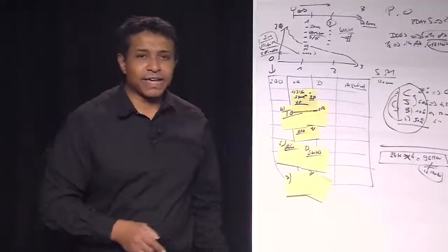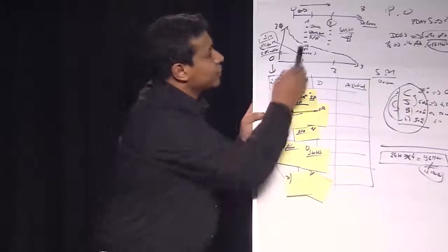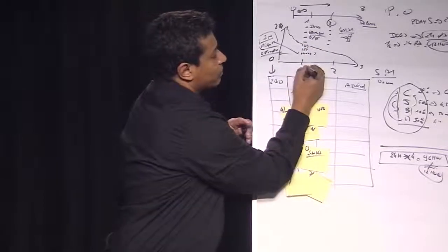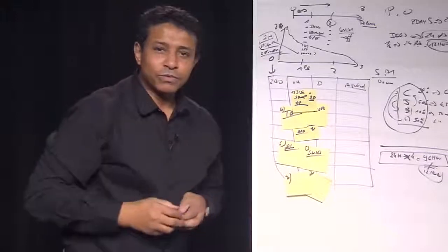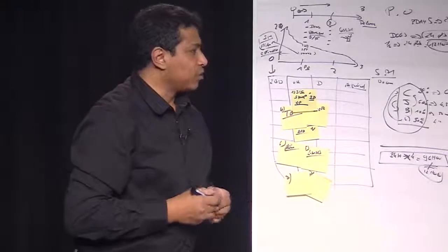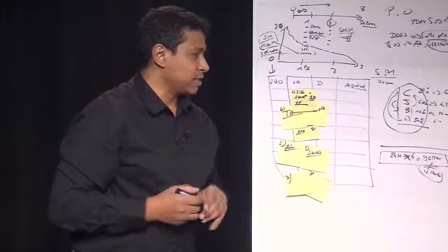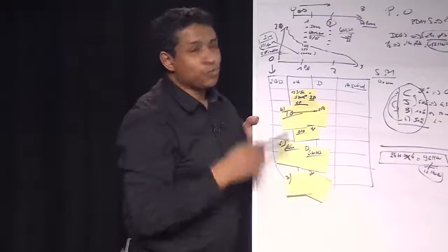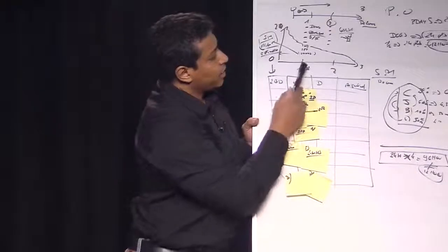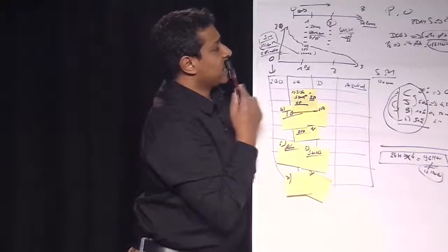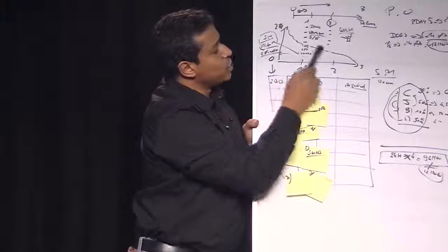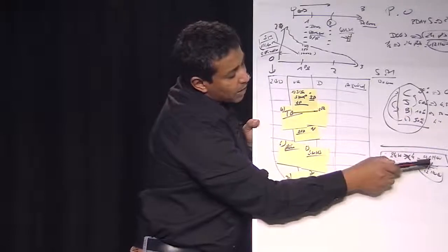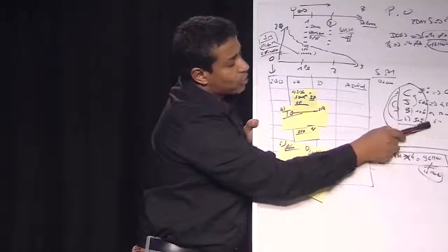Let's talk about the second case. Second case, I deliver what I have to. But the product owner says, no, no, no. This is not what I had in mind. How do we do this? We try to do two things. We try to, let's say, spread the charge in another way. We've got 2 days. Is it possible in 2 days to redo the whole thing? So respread the charge on my whole team, knowing that I have 96 hours or 4 hours a day.